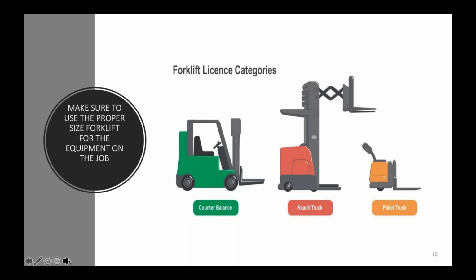For example, a dehumidifier might not weigh but 3,000 pounds, but it takes about an 8,000 pound lift to lift it because it sticks out so far in front of the forks that it has a levering effect on it when you go to pick it up. It's always better to get too big of a forklift than one that is too small.